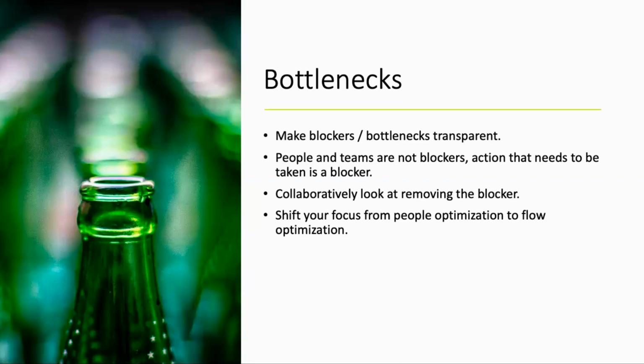The only way you can manage a blocker or bottleneck is to make it transparent. And how would you make it transparent? When you have identified all the workflow stages and have visualized them on the board, physical board or the digital board, you will identify at which workflow stage your work stops. Always remember that people and teams are not blockers. It is the actions that need to be taken that are the blocker.